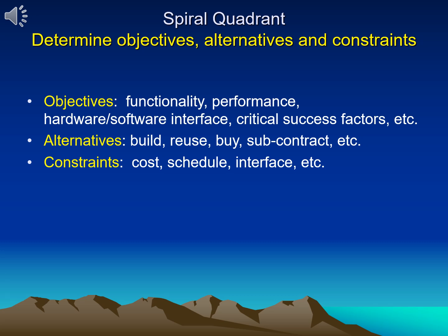3. Constraints. What challenges do we face? Every project operates within certain limitations, and these constraints can impact decision-making. The major constraints include cost. Budget limitations dictate what features can be implemented. A startup may not afford an expensive AI-driven chatbot, so it might opt for a simpler solution. Schedule. Deadlines determine the speed of development. If an app must be launched in 6 months, the team may choose agile development for faster iterations.